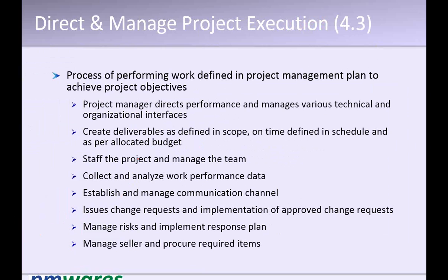Like in a previous organization I used to work, in the project management plan you write the resources you require from this to this. Then there was another resource loading sheet also. So every time we had to change the resource loading sheet, we had to change the project management plan also. So I ultimately went to the quality group. I said, why are you duplicating it?